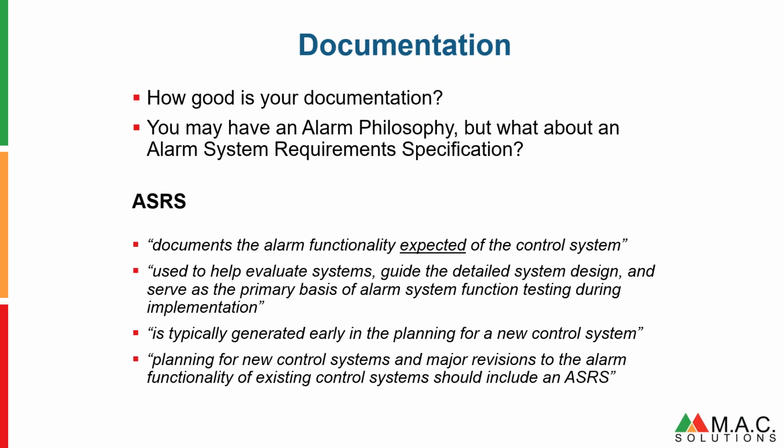And again, planning for new control systems and major revisions to alarm functionality should include an ASRS. So if you're upgrading your current alarm system to the latest version, which has new functionalities and features, are they the features and functionalities that you want, or do they not include those? So an ASRS is a really important document when you're managing change.